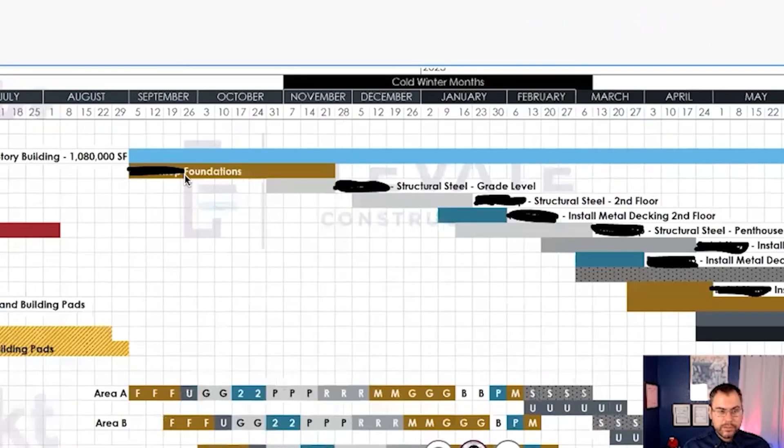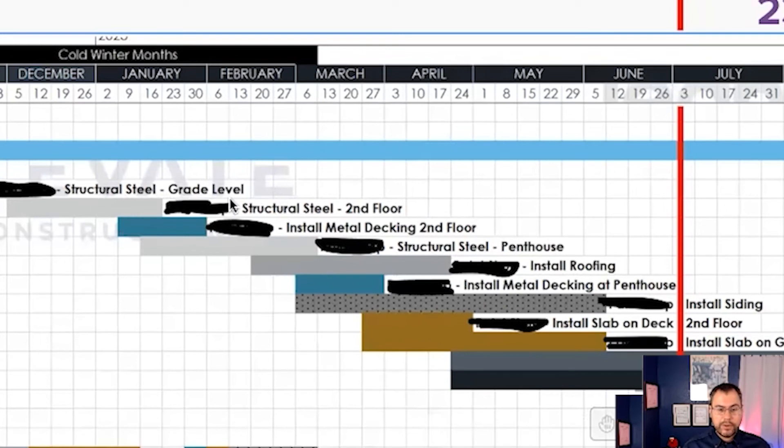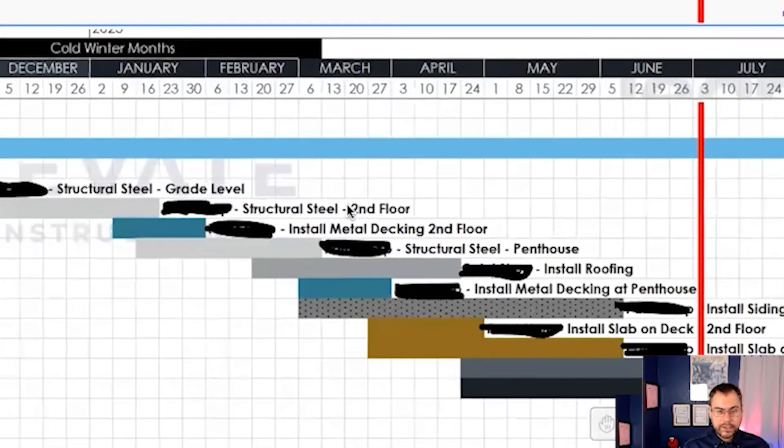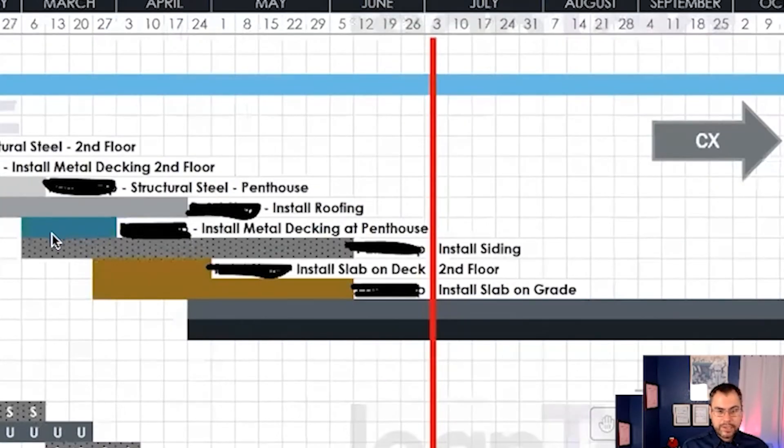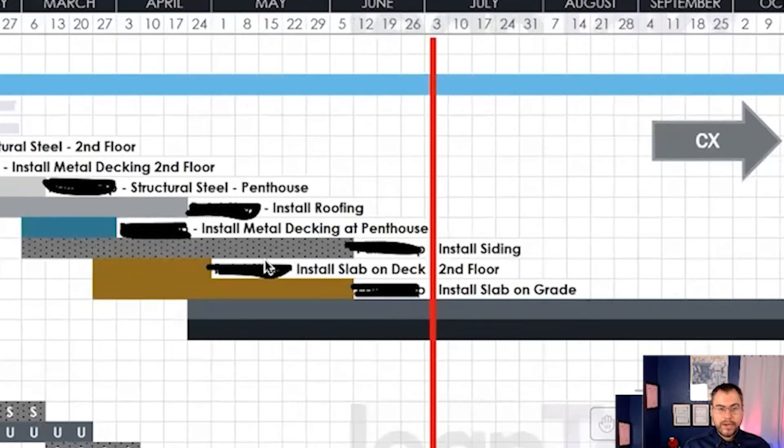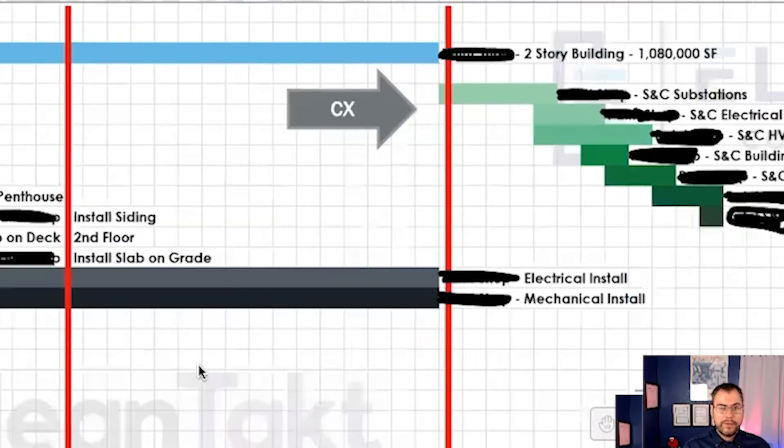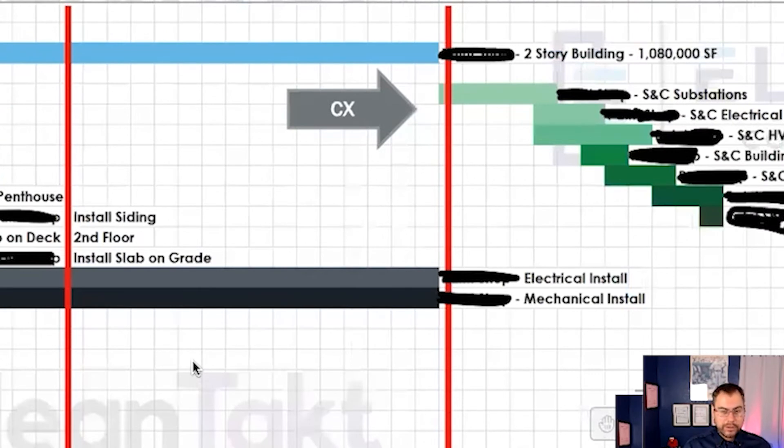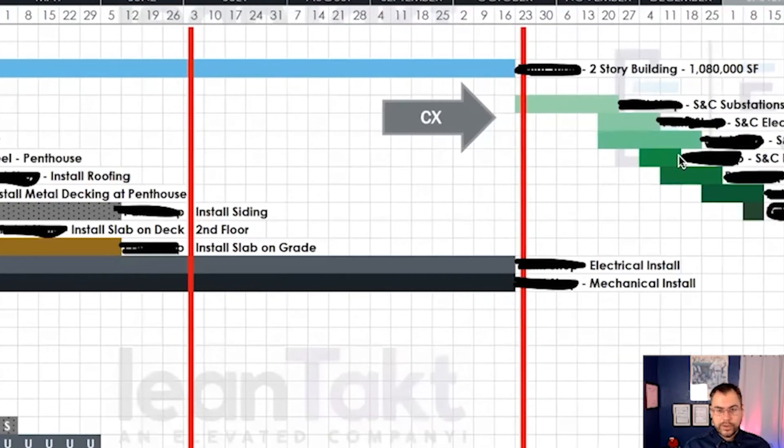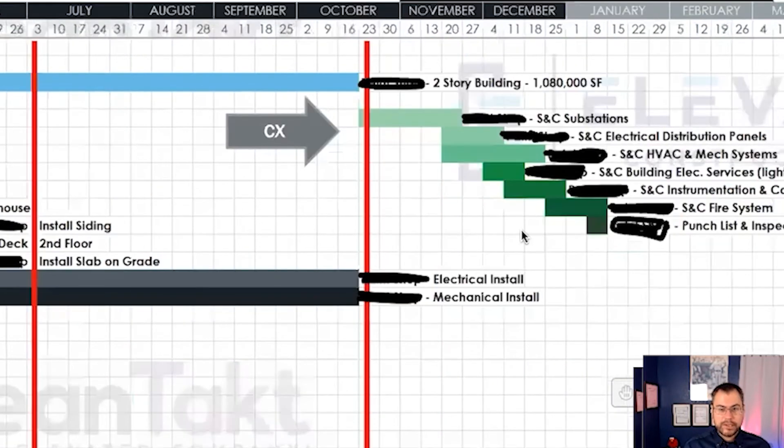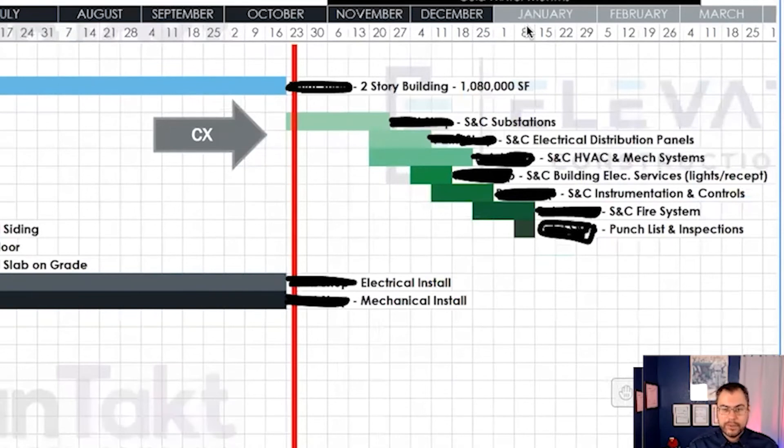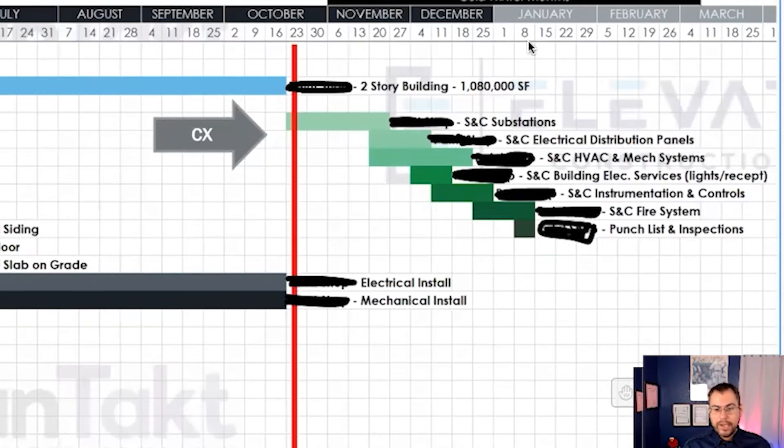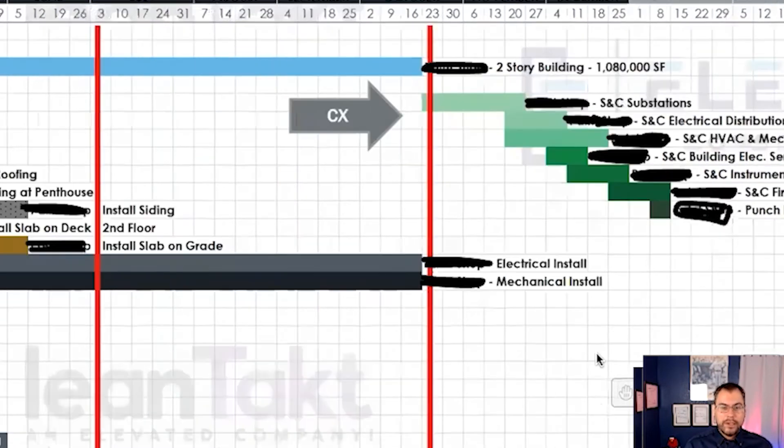Each one of these columns represents a week and it ends on October 16th before the start of commissioning for just construction activities only. And we've got foundation work. I'm only blacking out the name of the building, structural steel at grade, structural steel at the second floor. Then we've got metal decking at the penthouse level. Finally, we've got the exterior siding, slab on deck on the first floor. And then we have a lot of electrical and mechanical scope. You can see these two bars overlap for electrical and mechanical installation items. Traditional commissioning schedule here happening to the right.